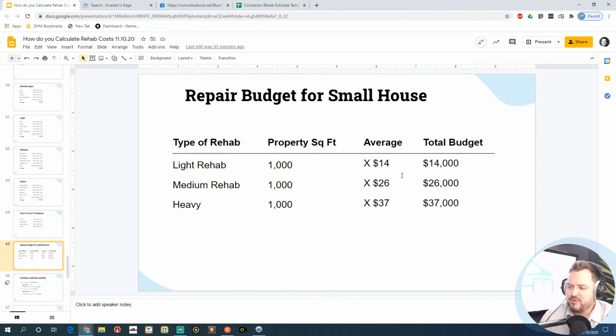Do you add bathrooms? The only time, Carlos, I'm only going to add bathrooms is if it's like in a basement or it's unfinished. I'm typically not going to add a bathroom unless it really makes sense. But yes, you could add a bathroom. However, we don't change the footprint. So if you can add a bathroom without changing the footprint, go for it. If you're trying to add the footprint, that becomes a problem because basically you've got to put new footings in, you've got to redo the structure, and there's a bunch of stuff that comes with that. So I hope that helps.